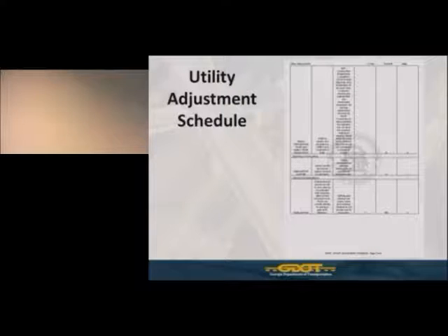And they go in and identify splicing or tie-in work, and then service considerations. I mentioned the special requirements potentially have a service consideration. This is where they've properly identified it even in their detailed work plan, and this should have been reflected in section B as well, the special requirements. But it says cut over 2 special circuits to new cable to be arranged with customer after normal business hours. These are circuits at building to entrance gate at Fort Benning. So this is on a military base, and they have to do the work after normal business hours. This item should have also been identified in section B, but at least it was captured here to show that they have a period of time to account for when they must make arrangements to perform this final splicing.